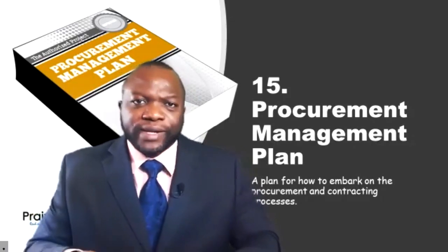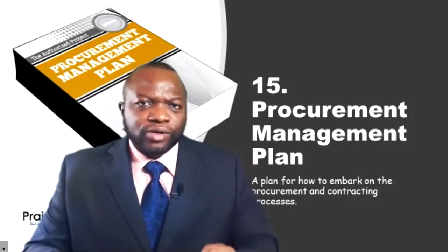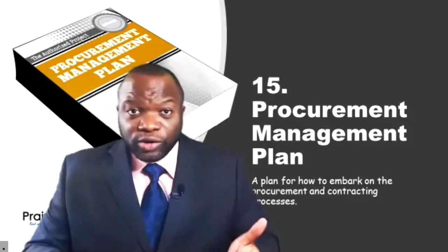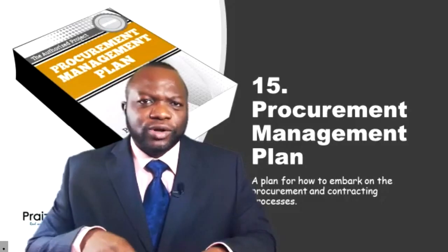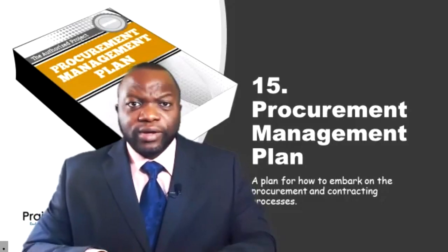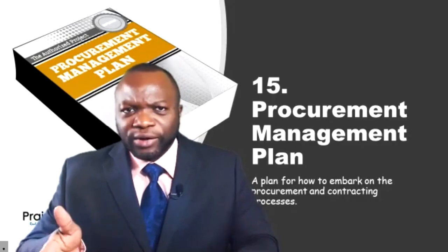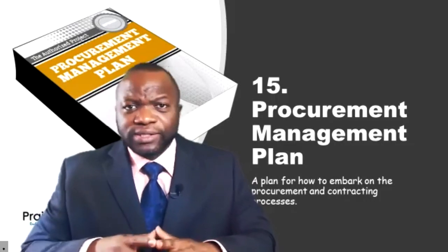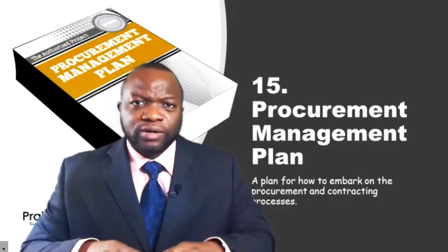Planning procurement and putting this stuff into a procurement management plan could also involve the nature of payments, the nature of contracts, contract types. Those should also be factored in. Are we going to use a fixed price, cost reimbursable, a time and material, and specific to the construction industry? We need to ask ourselves, is this going to be a design build, a design bid build? Is it going to be a build, own, operate, transfer? What is it going to look like?